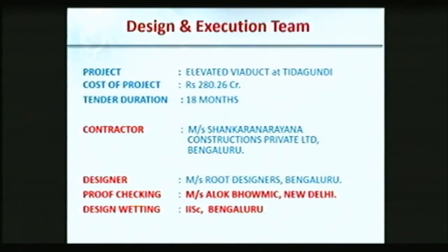And I should give the credit to the people who are involved. The cost of the project is about 280 crores. And there are a lot of savings, which I should not tell you, because otherwise government will ask the contractor to repay back. So let us keep that a secret. So the tender period was 18 months, but we could complete in 12 months. And the contractor was one of the good contractors, Shankar Narayan Construction Private Limited of Bangalore.